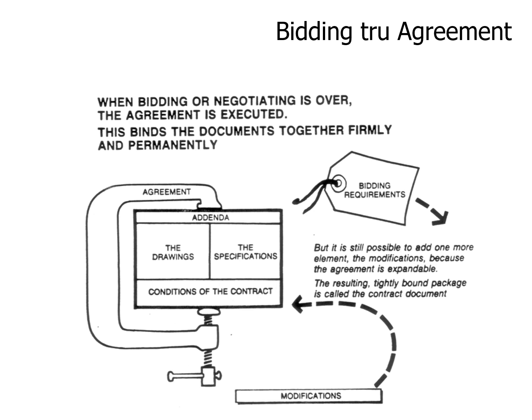But we have an agreement, which, think about it, includes all the addenda, the drawings, the specifications, the conditions of the contract, the bidding requirements, and any modifications to the conditions of the contract. Okay, that's where we're sitting down, getting ready to go.